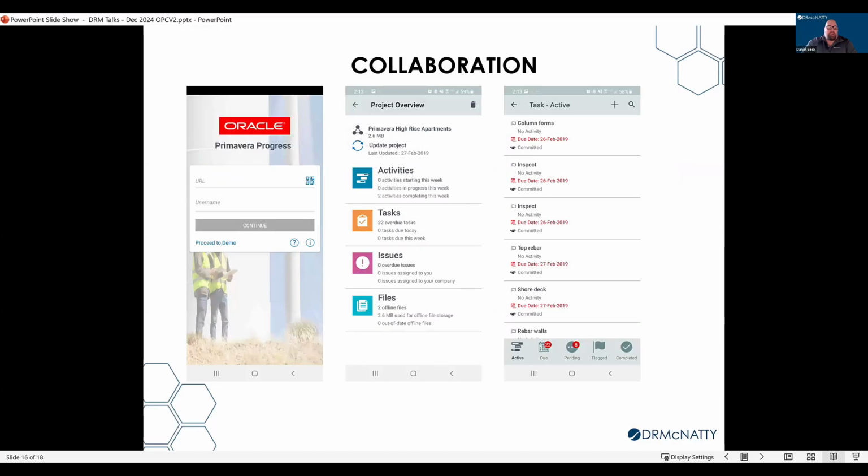Some of the questions that I get are in regards to the mobile feature within OPC. Can you talk on some of the capabilities that are available for users, whether it be updating, viewing projects, looking at data within what's called Progress, which is the OPC mobile functionality? Yeah, so there's two components to the mobile app. There's the schedule activity progression, as far as if I'm an owner or assigned resource, and I'm simply putting progress against an activity. And then maybe I'm taking a job site photo of that activity, doing some simple annotations, and giving a reason why this activity is slipping.